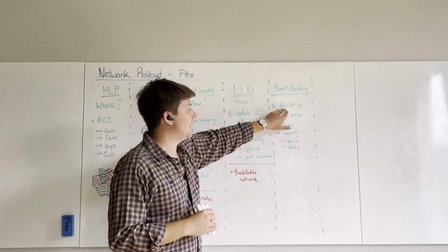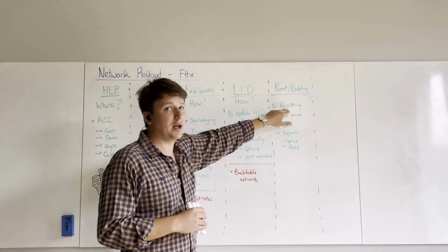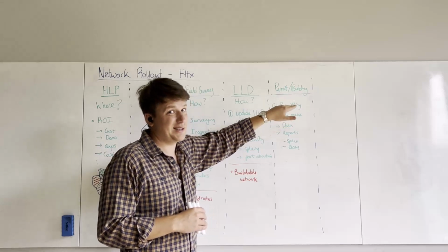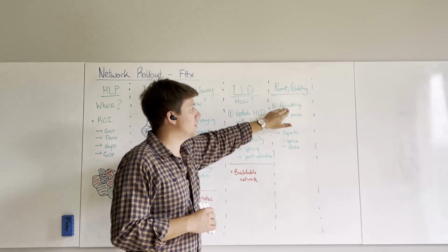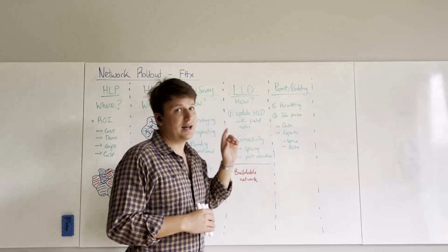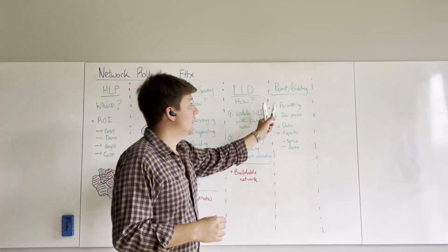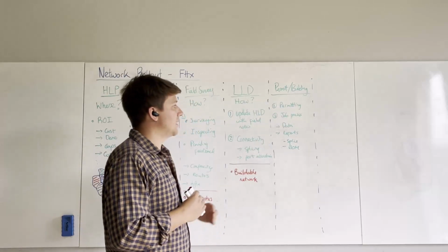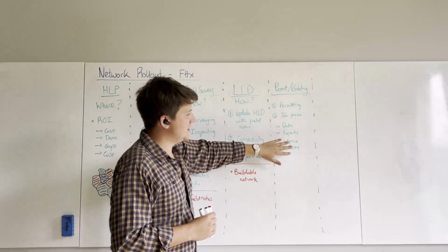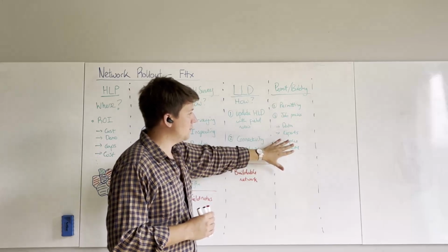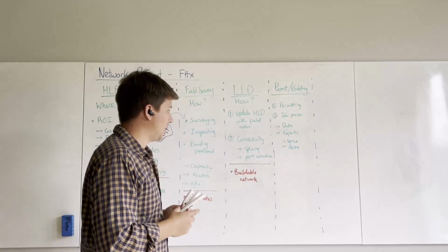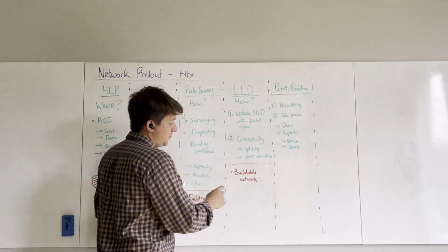Then you standardize the outputs, and more often than not you give the local governing body all the documents they need. So spend time up front configuring all the documents they need. Have a system whereby you can click and run a standard report. It will speed up this process tremendously. Other job packs, this is different depending on the teams that you're sharing the data with, but the same thing applies.